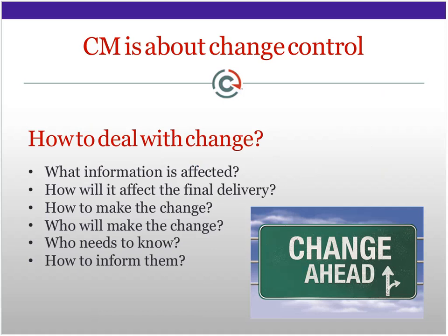When you have to deal with change, you have to realize some things. You have to ask yourself what information is affected by this change, how will it affect the final delivery, how to make the change, who will make the change, who needs to know, how to inform them. And this is all about the big problem of the information flow going through your system development: the complete team of people that's involved, the customer, subcontractors, etc. I probably have forgotten some questions, but you can think of quite a few.